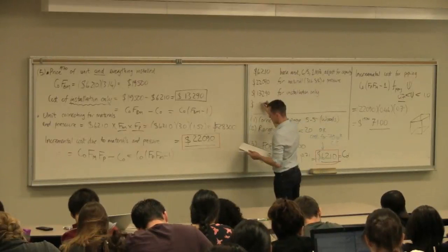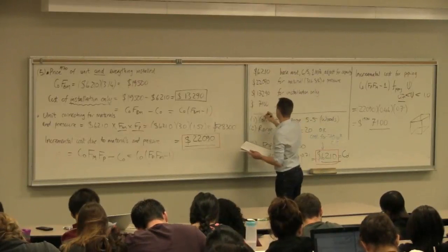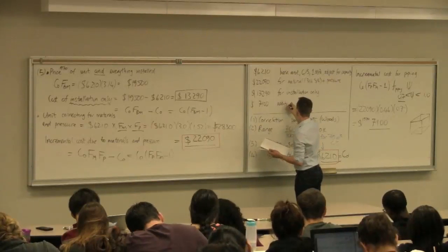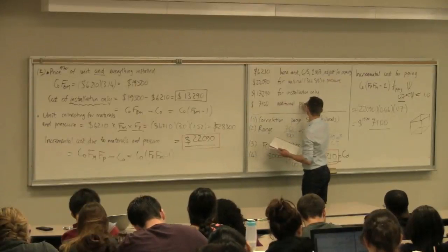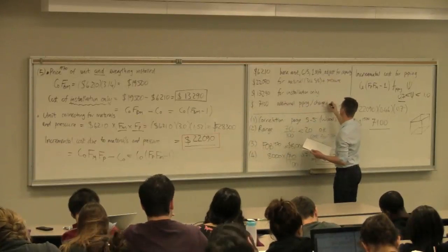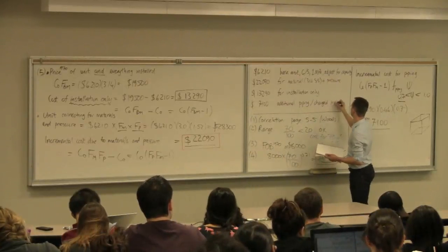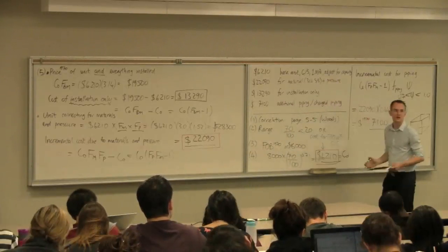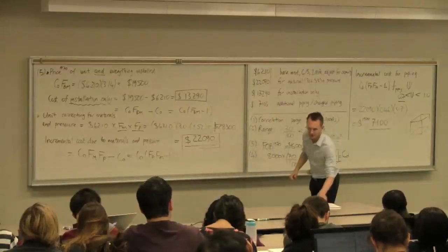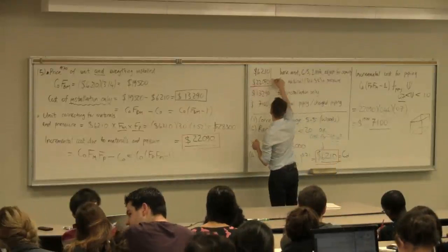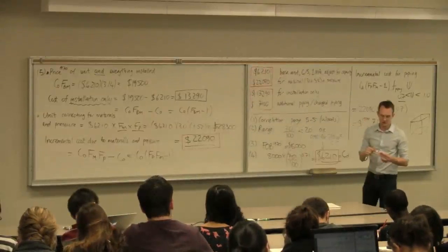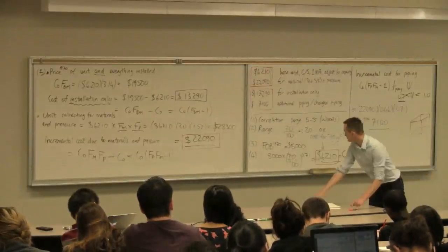And then we're paying finally an additional $7,100 in additional material for piping. Well, we can just call this simply changed piping. The fact that we're using higher spec piping than we normally do. So these first two, they go to the vendor. Those first dollar figures that you pay your supplier of the unit. And then these last two, these go to whoever's managing and installing the unit for you.